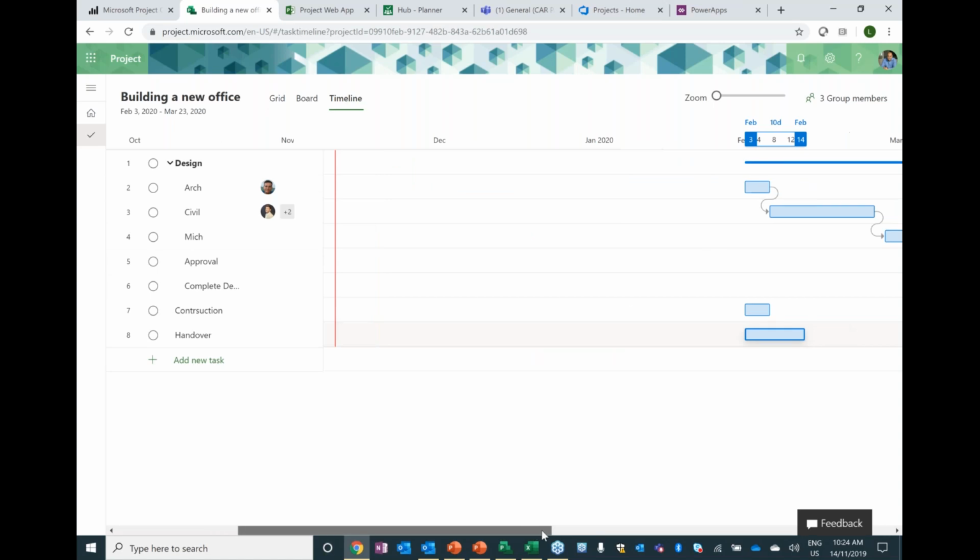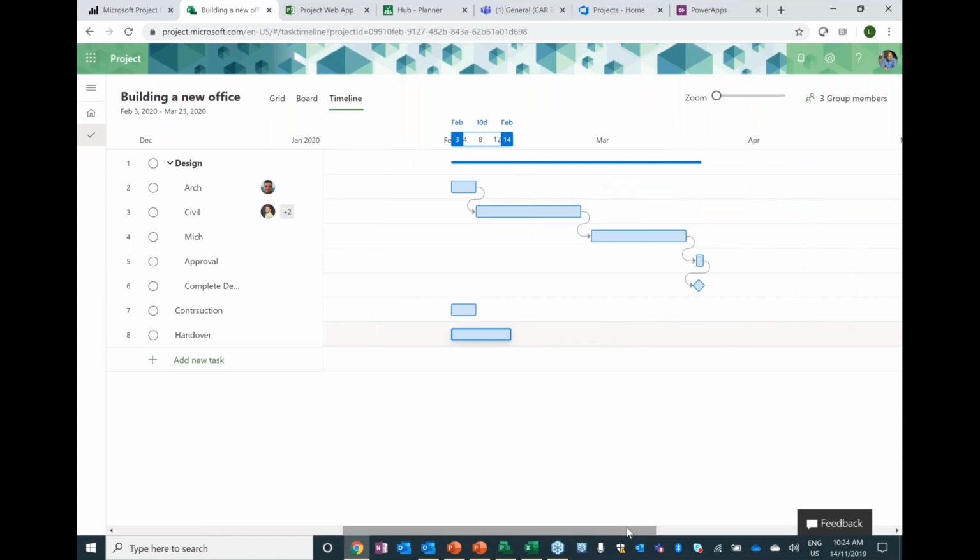Anyway, so new task created here with a duration. And then I will say, well, I want to link this task to this milestone. And it's basically, after this milestone finishes, I want the construction to start. You can have a very nice experience where you literally click, drag, and link, and that's connected. And same thing I can do again here: click, drag, connect, and connect, which we didn't have in